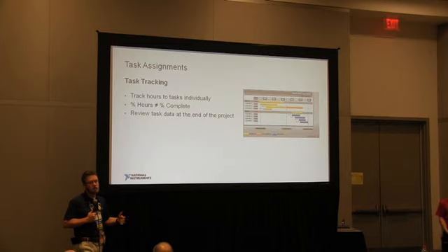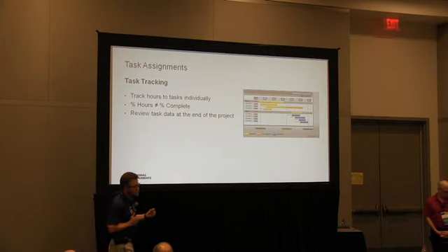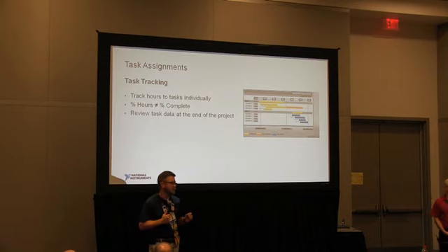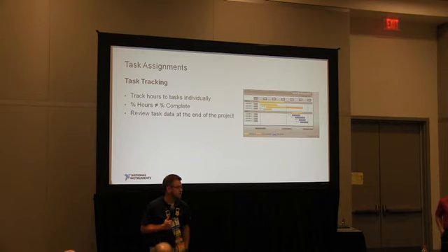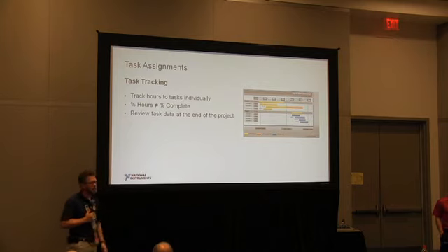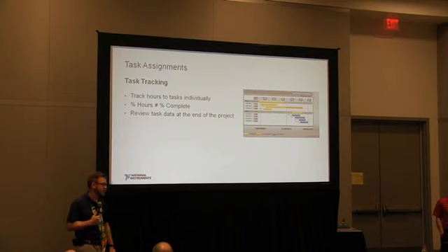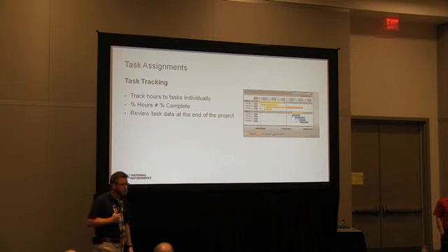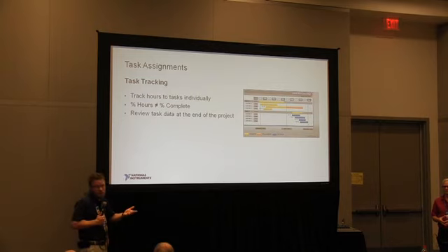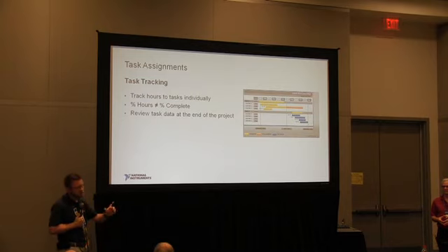You know, it's a hard thing to do, to know how far down to break something. Like we talked about the class-based stuff, you could say, implement this class, and when you're done, the task is done. Depending on how difficult it is, if it's a class that takes one day to fill in all the methods. I'm thinking of a messaging architecture where every different message is a class. Maybe that takes a day, and it's either done or it's not. Or you could say, I have 5 of the 12 methods implemented, and that would be an easy metric too. But yeah, it's a good point.